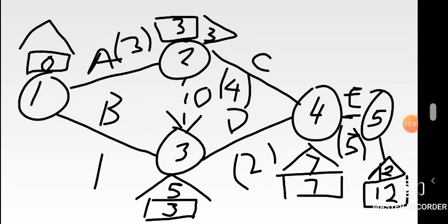Let's go to the other route leading to 1. 3 to 1. What's in the route? There's a 1 in the route as you go to 1 from 3. What was your latest completion time as of point 3? It was 5. So it's like 5 minus 1 is 4. This one has given us 4. That route from 2 to 1 gave us 0. Minimum or the least of the two, it's 0. So you allocate 0. So usually when you're coming backwards, we're allocating the least number if there are two routes leading to one particular node.